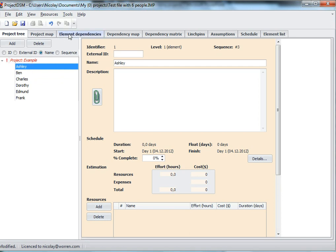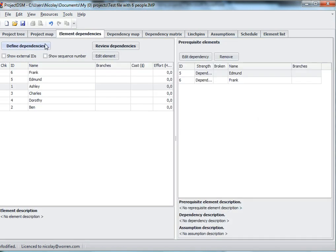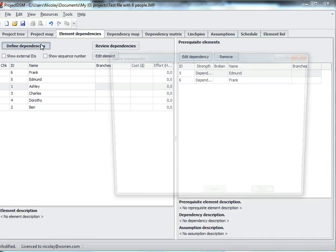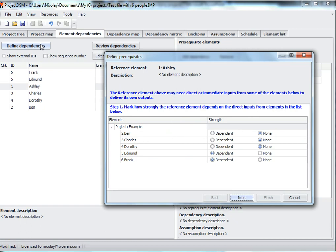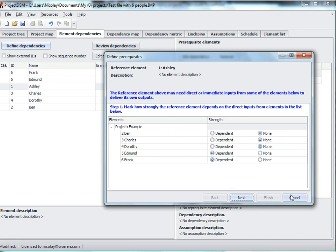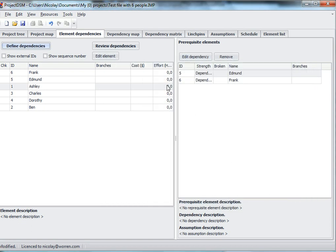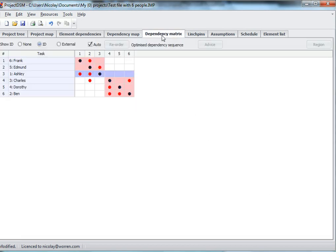For each person, I've entered the information I provided about the dependencies. So as an example, if you go to Ashley, I have indicated that she is dependent upon Edmund and Frank, but not the three other participants, and similarly for the other five people. So this is the key step in this analysis to enter this information, and once you've done that, the tool then produces the matrix.